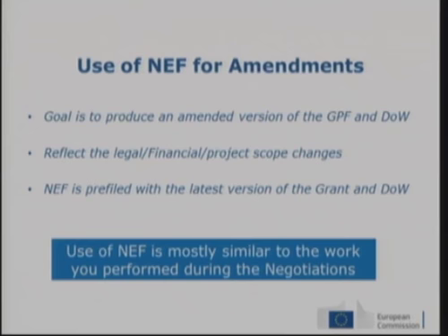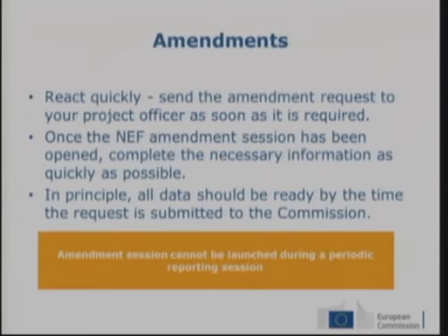But for your call and the previous ones, you don't have it by default. So what you have to do is request an amendment to have the possibility of using this electronic signature, because that will trigger the process of your leader appointing the financial signatory, and then this financial signatory will have the possibility of signing electronically. So please, if you don't have the electronic signature in your grant agreement, you can have it via an amendment.